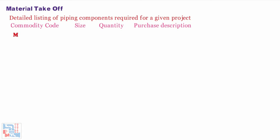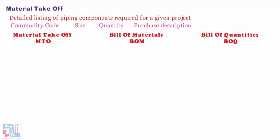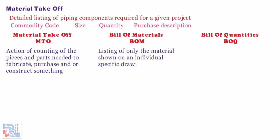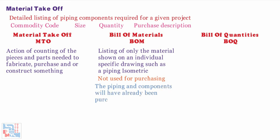Many times we get confused with material takeoff MTO, bill of material BOM, and bill of quantity BOQ. Piping MTO is the action of counting pieces and parts needed to fabricate, purchase, or construct something. Piping bill of material (BOM) is normally a listing of only the materials shown on an individual specific drawing such as a piping isometric. The piping BOM is not used for purchasing; the piping components will have already been purchased and are readily available to the fabricator who builds the line from the material specified on the BOM.